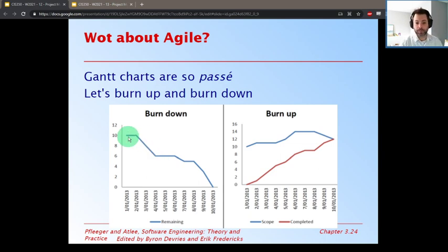With this perspective, you can see where we get stuck in a project. There's nothing to say that, okay, we have 6 left. Let's say we finished 6 tasks in here, but our customer added 6 more. So we didn't actually gain anything project-wise. We got the task done, but it's not shown in this chart.